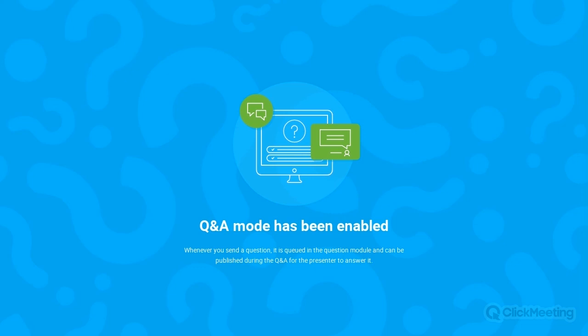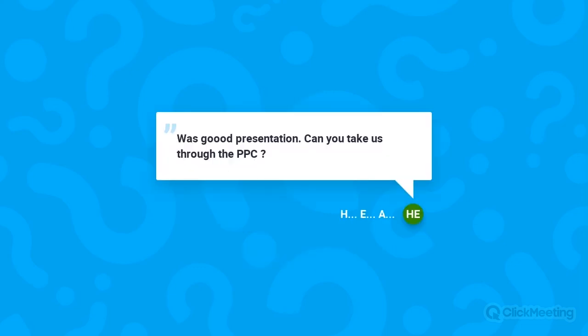Yes, I can. So PPC stands for Percentage Plan Complete. And basically, it's a measure of how good your short-term planning is. So if we speak about those production plans, those week-in-advance plans, what we're measuring with PPC is how many activities in that week finished in that week.